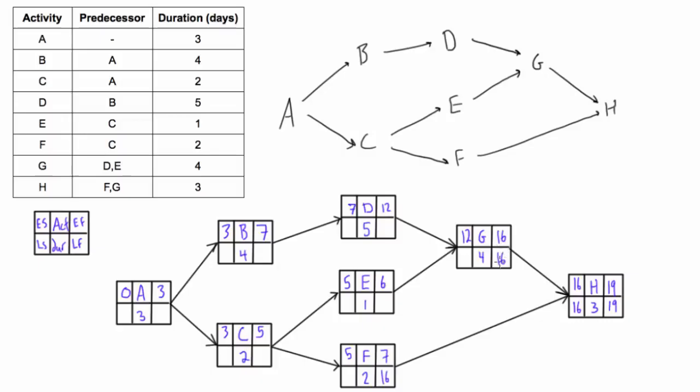We can also bring it into this spot because there's no competing arrows coming in. So first of all, we'll start up here. 16 minus 4, we have 12. And again, we can bring this 12 to here because there's only one arrow leading in. We can bring this 12 down here because there's only one arrow. 12 minus 1 is 11. And up here we had 12 minus 5 is 7. Again, you can jump around as much as you like here. Down here, we forgot to finish this guy. We have the 16 minus 2. We'll get 14 here.